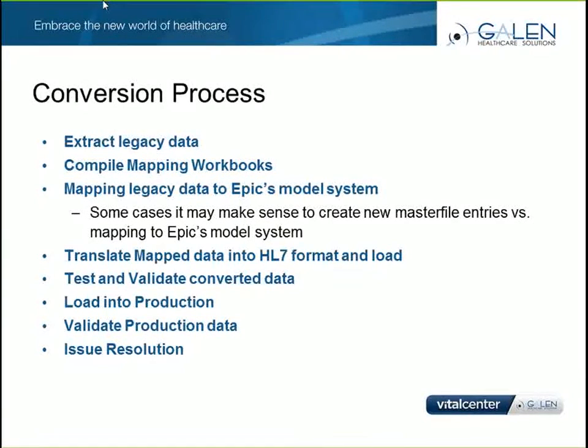Testing and validation of the data is very time and resource consuming. You really want your end users to be able to compare Allscripts on one screen and Epic on the other. We highly recommend your analysts and SMEs perform the unit testing to alert of any significant errors that they notice between the systems. We encourage you to build a diverse team to help validate and test the different data elements.